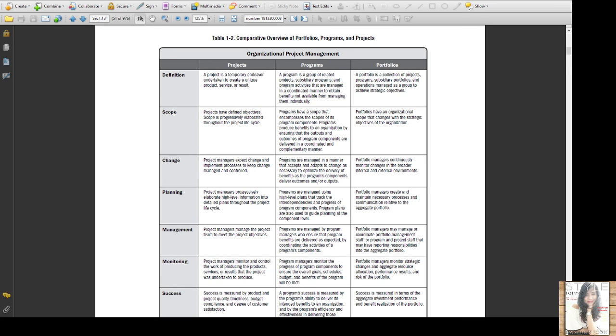However, when the organization has a project designing and constructing a power plant, and then operates the power plant to generate energy, those related projects can be grouped into one program. Thus, the power program and a similar water program become integral components of the portfolio.